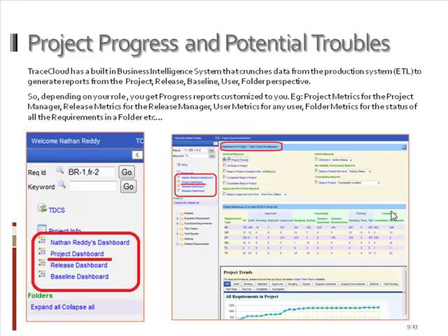For example, you could see how many requirements of business requirement type are in an incomplete stage in this release and click on the link and get the numbers. And the graph you're seeing here is a trend graph of each of those parameters. So you could see, for example, if you have go live coming along for a release, you would expect to see your completed requirements coming up and meeting that reference bar at the top.